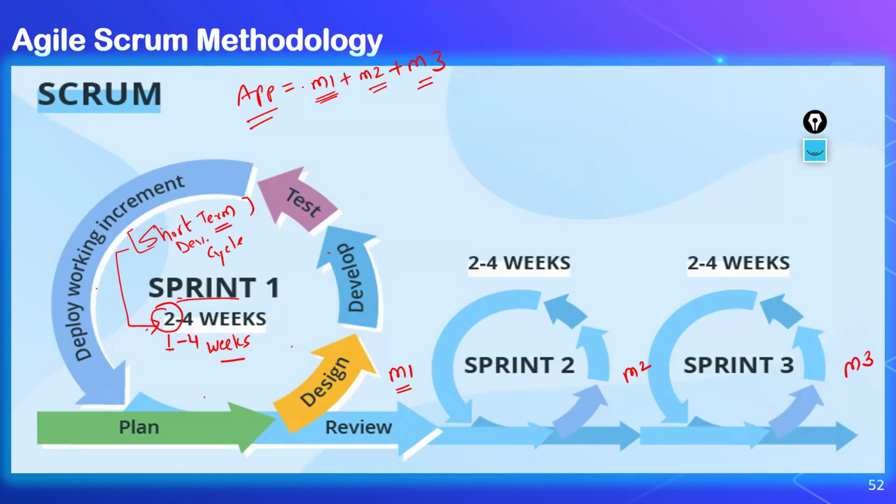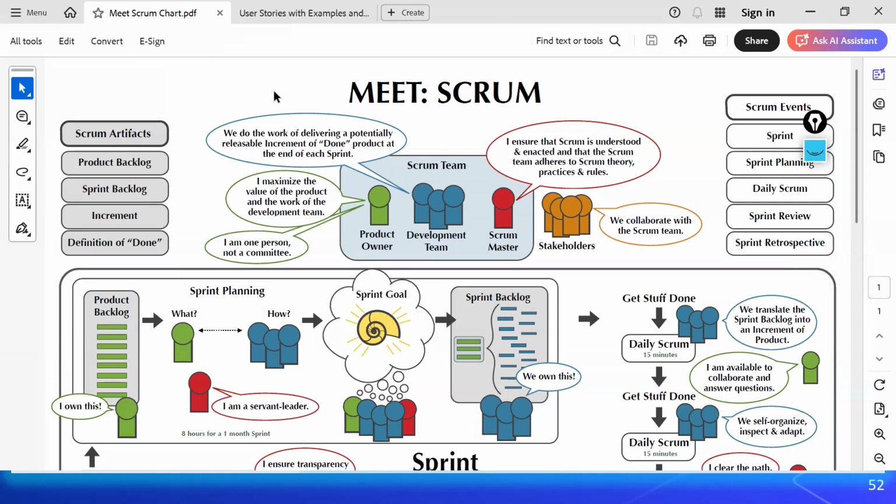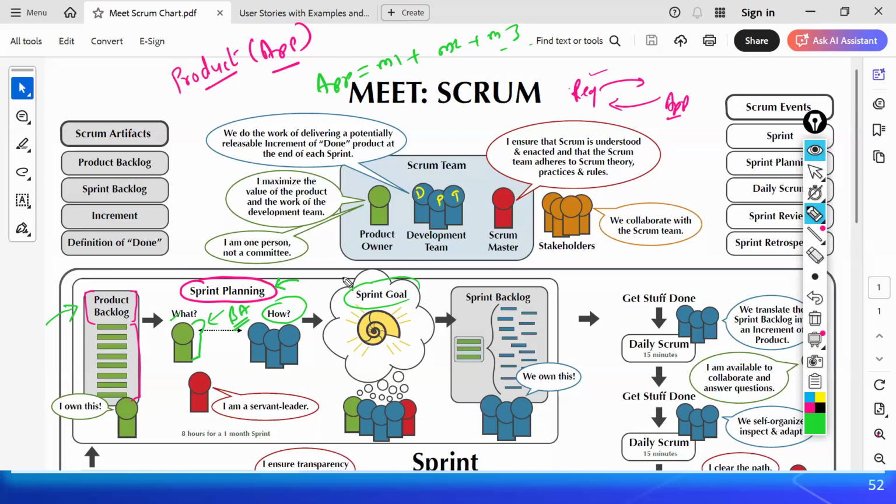I told you that with one sprint, you are creating one module or something, because we are going with partial development for each of these. And that is the reason that I will pick up some of these items from the product backlog, and I'll put those here in something I call the sprint backlog.